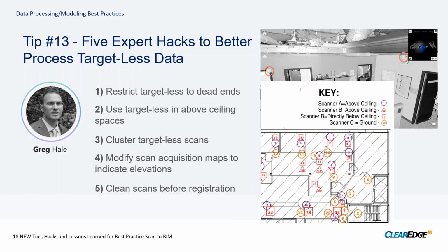That provides a quicker way to move around the building, with 3 scanners going at once in every room at different levels. So you don't have to keep going up and down with the same scanner. It's a highly efficient way to do it if you have the resources to throw extra scanners at it.